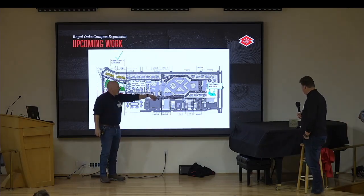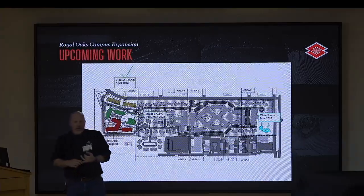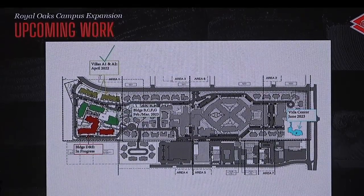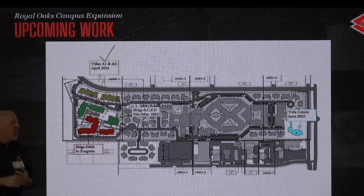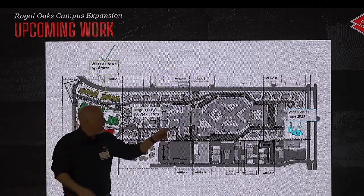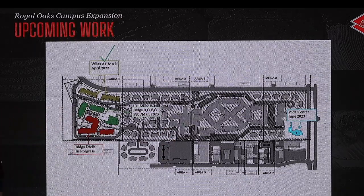So last month we had a sort of a to-be-determined on the Vita Center because we didn't know when exactly the makeup air was coming and when the pool was coming. We now know when those are coming. At least we know when the pool is coming and the makeup air. We just got a date this morning, a ship date of like April 7th. So we've got a good idea when that will show up on site. So we've zeroed in on June for the Vita Center, and we feel pretty good about that. Plus, as I said, Kelly's having a baby, so he's got to finish by then.